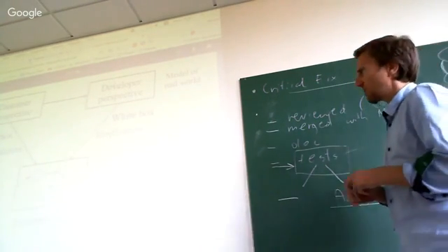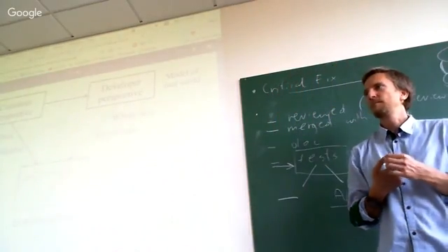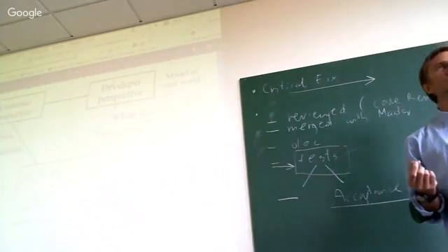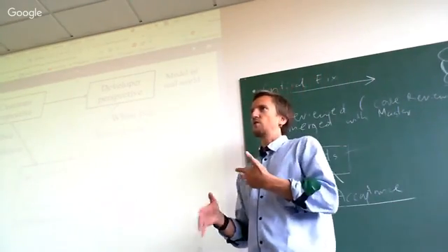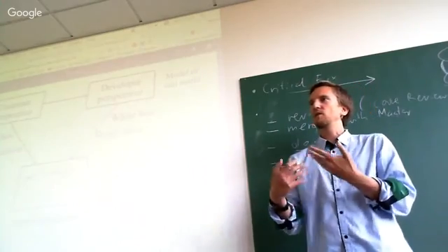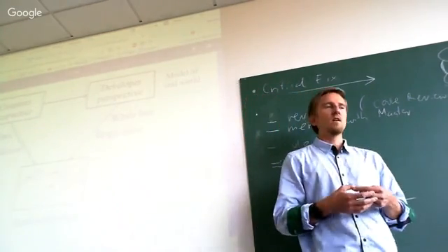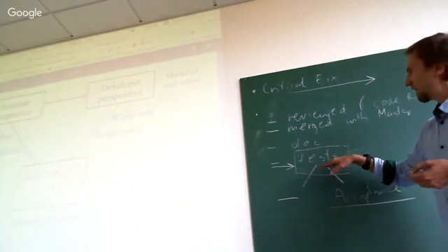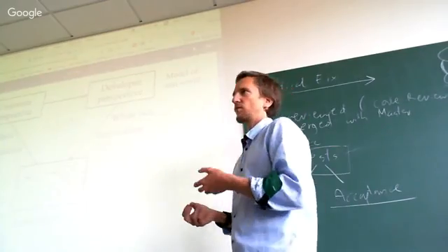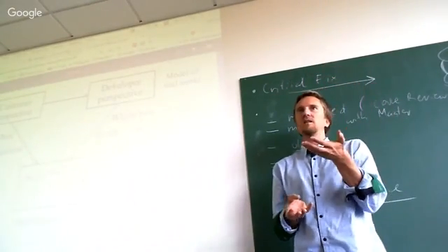By the way, I'm using the terms regression tests and unit tests sometimes together. So what is regression testing? Yeah? Regression testing is when you update something, you don't break some of the existing behavior. Exactly. So the beauty of automation and unit testing is that every single time you need to merge or commit something to a repo, you can run all those tests and make sure that the new changes you're making to your code do not bring havoc into the existing functionality, right? So part of the definition of done is to have tests not only passing, but to have tests for what you've just created, right? So if you're adding a new module, new classes or new functions, you should write tests that make sure those new pieces of code work correctly, right?